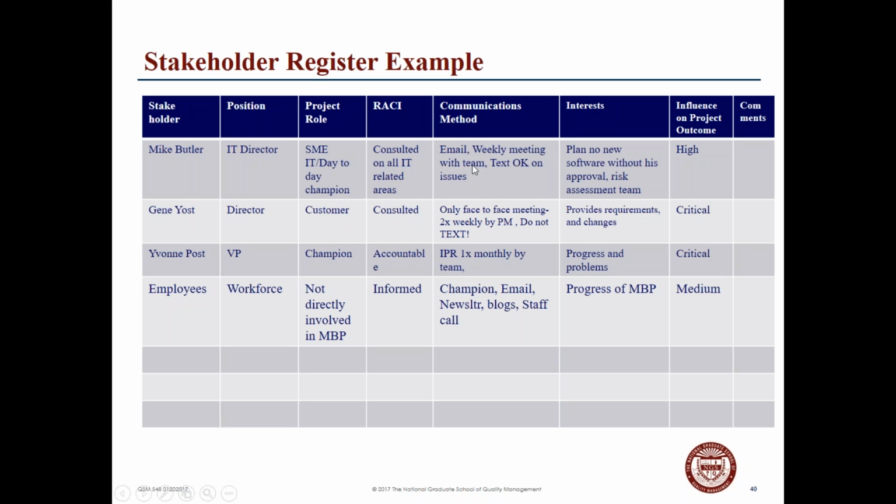What's the comms method? So for example, the IT director, it's a weekly meeting. This particular individual wants face-to-face meetings, twice weekly, do not text. The champion wants to meet monthly with the team. And again, with the employees, it's a newsletter, blogs, and staff call.